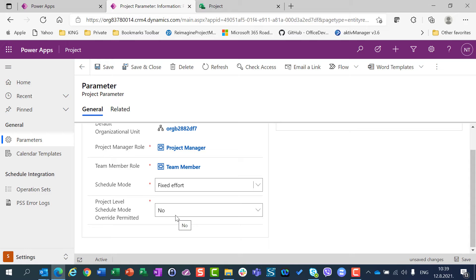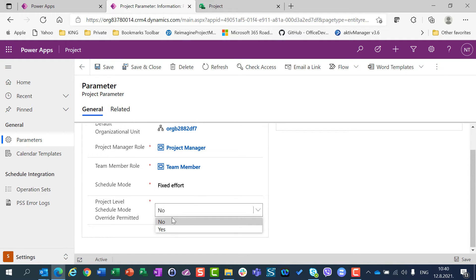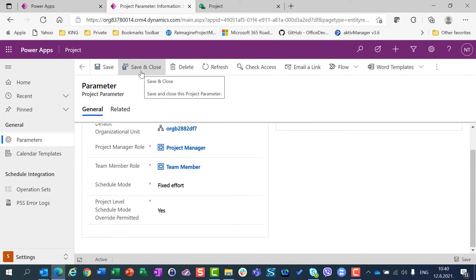If I leave this set to No, it means I will not be able to create a project with a different scheduling mode. So I will not be able to choose a different schedule mode for each individual project — it will always be Fixed Effort. But sometimes I would like Fixed Duration, sometimes Fixed Effort, and sometimes Fixed Units. So I'm going to change this from No to Yes, which means that each time I create a new project, I will be able to choose the schedule mode.